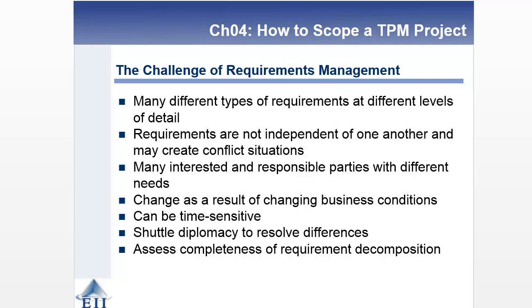But again, just keep in mind, requirements breakdown structure, very good idea. You want to work through it, but you need to be realistic that you're not going to capture probably all of the requirements during this phase, and you need to engineer your process so that you can handle those changes as you go forward.